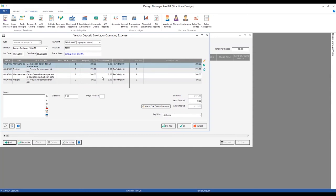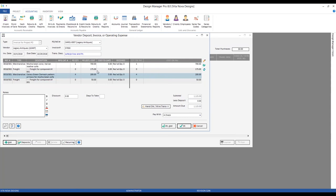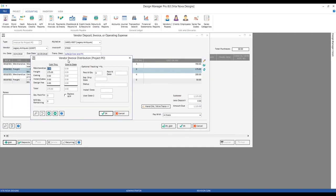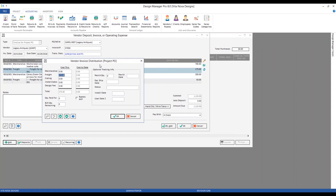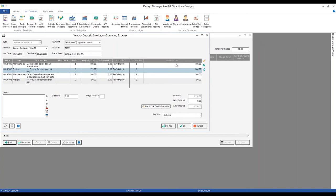We can see the cost of our sofa, our pillows, and our estimated freight costs. Perhaps the bill from Legacy showed $200 for the sofa's freight, not our estimated $175. We can absolutely make that adjustment by simply changing our freight line and updating the cost from $175 to $200. When we do, the cost on the invoice column for the freight increases appropriately while keeping our estimated purchase order cost at the original $175, so we can compare estimate versus actual cost.